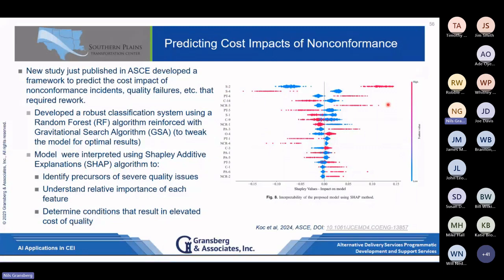I mean, because I'm from the school of management that likes to apply the 80-20 rule, right? Where 20% of my pay items have 80% of my money, 20% of my project drives 80% of my cost. The other 80% is not going to affect anything unless I don't manage it, unless something comes up, right? To be able to get the project done, I'm going to look at where the money's at in the project. I'm going to look at the things that drive the schedule, that drive the production, and those are the things I want to manage with malice and forethought.